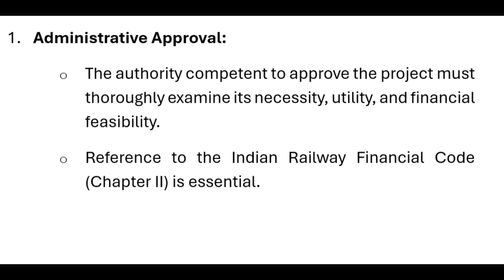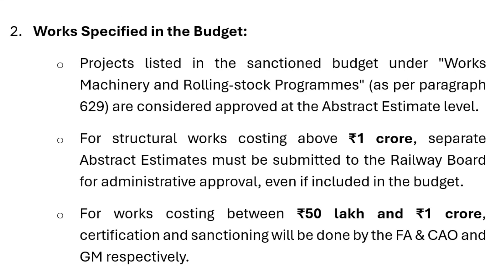Approval process: First, administrative approval — the authority competent to approve the project must thoroughly examine its necessity, utility, and financial feasibility. Reference to the Indian Railway Financial Code, Chapter 2, is essential. Second, work specified in the budget — projects listed in the sanctioned budget under Works, Machinery and Rolling Stock Programs, as per paragraph 629, are considered approved at the abstract estimate level.